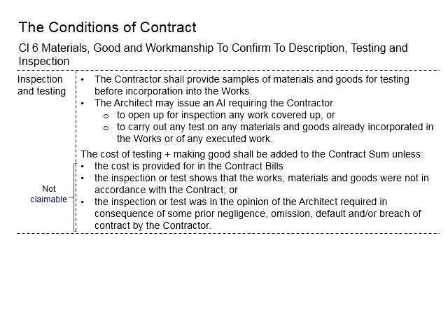Even though the test outcome may be positive, that the materials are meeting the requirement, however, due to the reasonable doubt or due to the high chance of consequences as a result of the relevant negligence or omissions or defaults, it is also not claimable by the contractor.